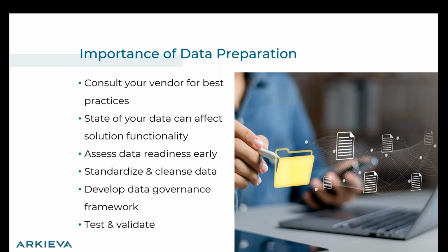Since we talked about data preparation and the overall quality and status of your data, it's very important in these projects because, again, it's a very data intensive project. So you have to think in terms of, hey, is my data ready, or do I have to do a pre-project to get my data ready before I can do the selection process and then eventually an implementation? So you may use internal teams to look at the status of your data. You can also consult the vendors if you have already talked to one or two of them for best practices.